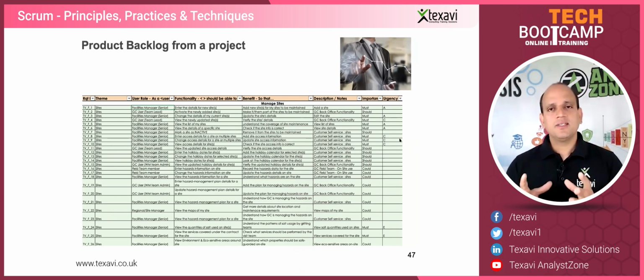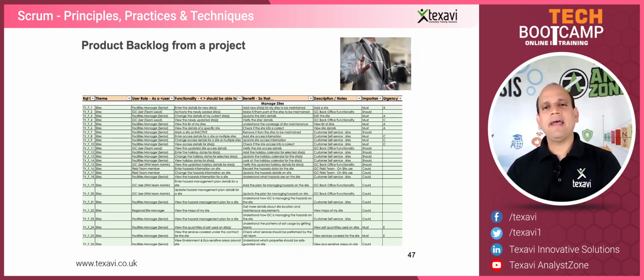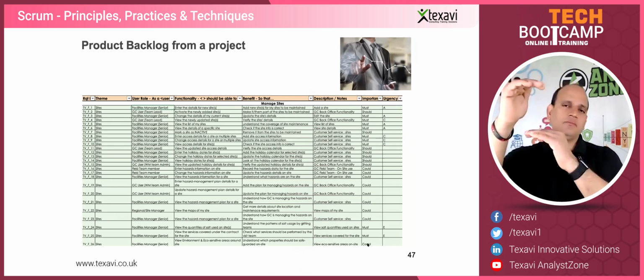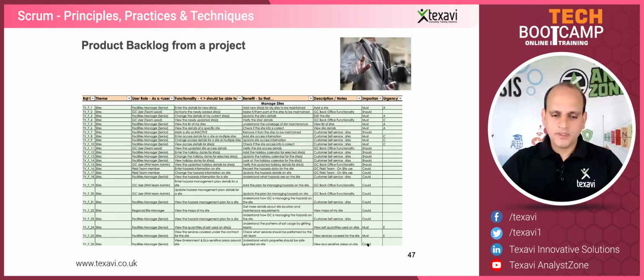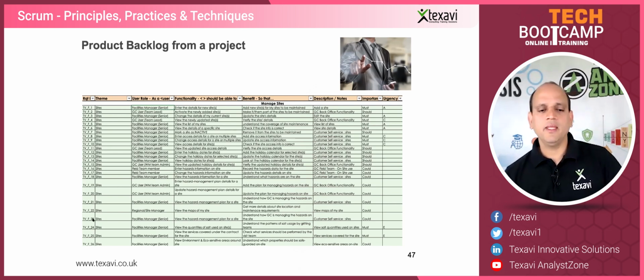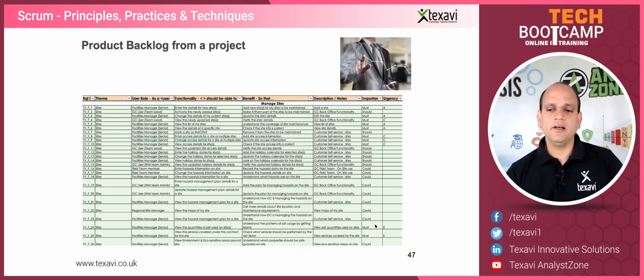So those 6 items or the stories are going to go into the sprint backlog, the upcoming sprint. Remember that the most important, most urgent are always taken up into the backlog, and the rest of the items are all down. They're at the epic level, for example. They may not be detailed enough, and that's why they're lying down. And these first set of 10 stories could actually get into the next sprint. They're the candidates for the sprint backlog.